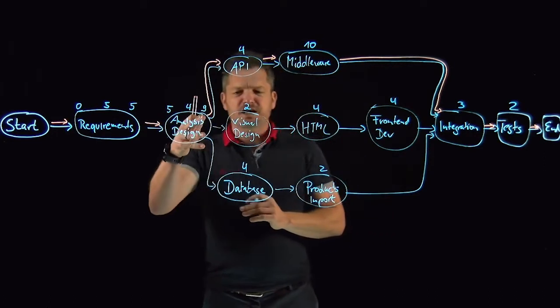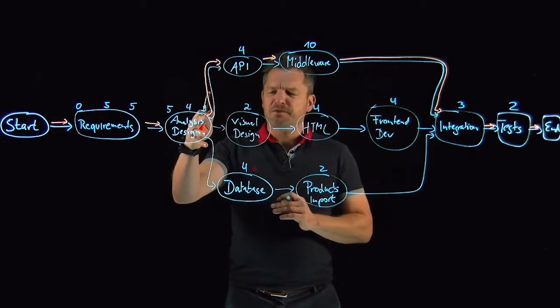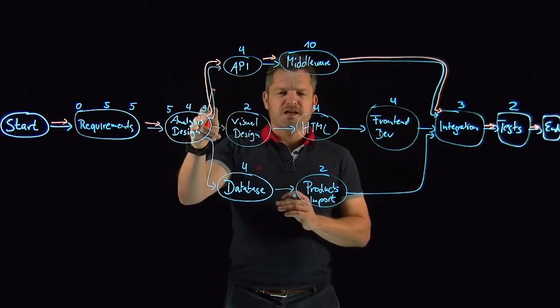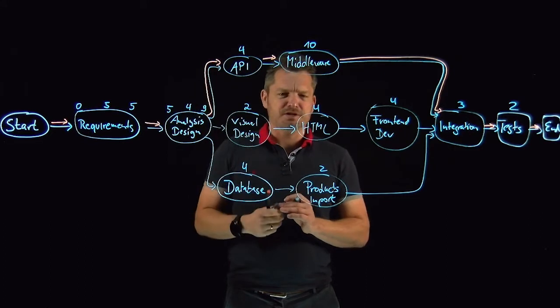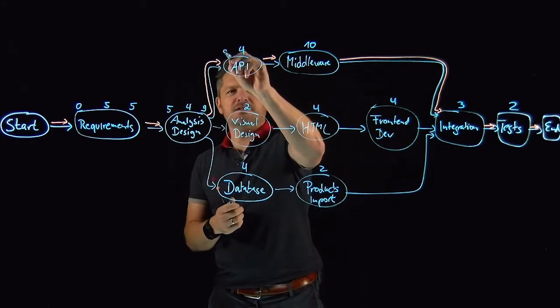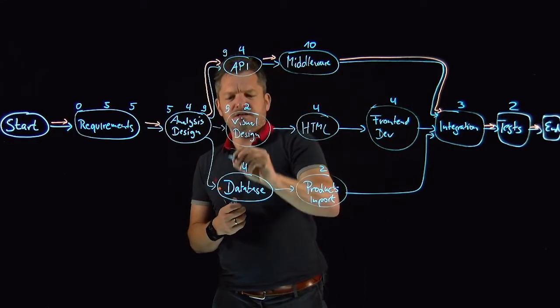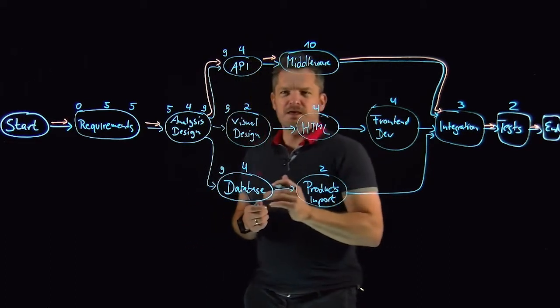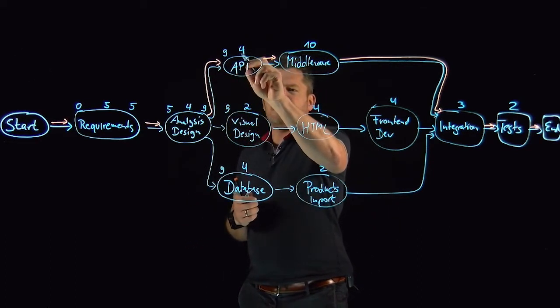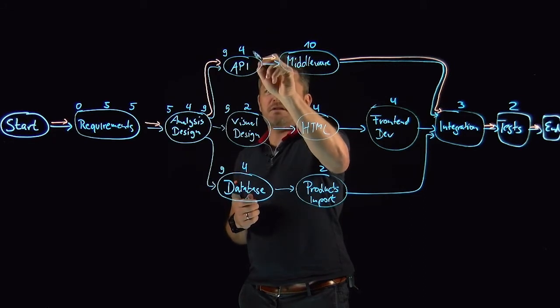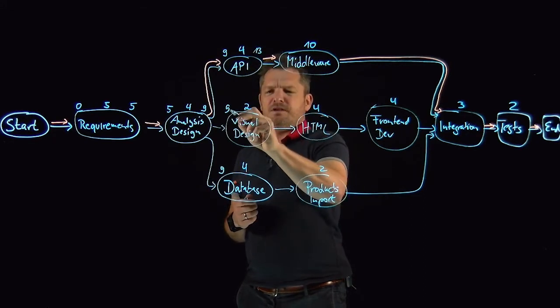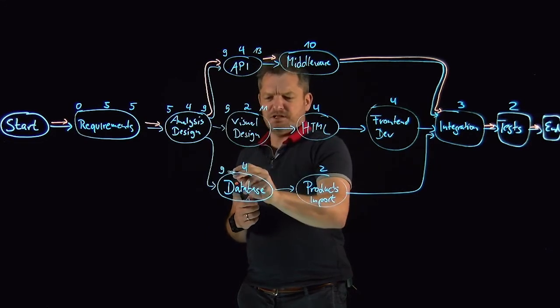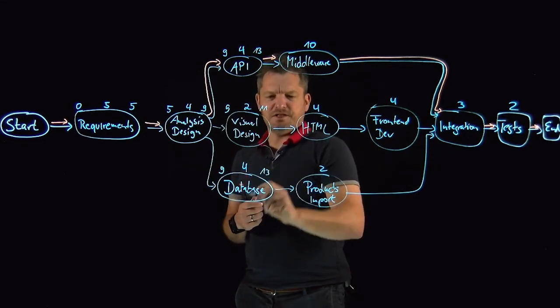And now all the follow-up activities all these three cannot start before day number nine. So we can add nine at early start at all of these tasks for early start. Nine plus four we have thirteen. Nine plus two we have eleven. Nine plus four we have thirteen over here.